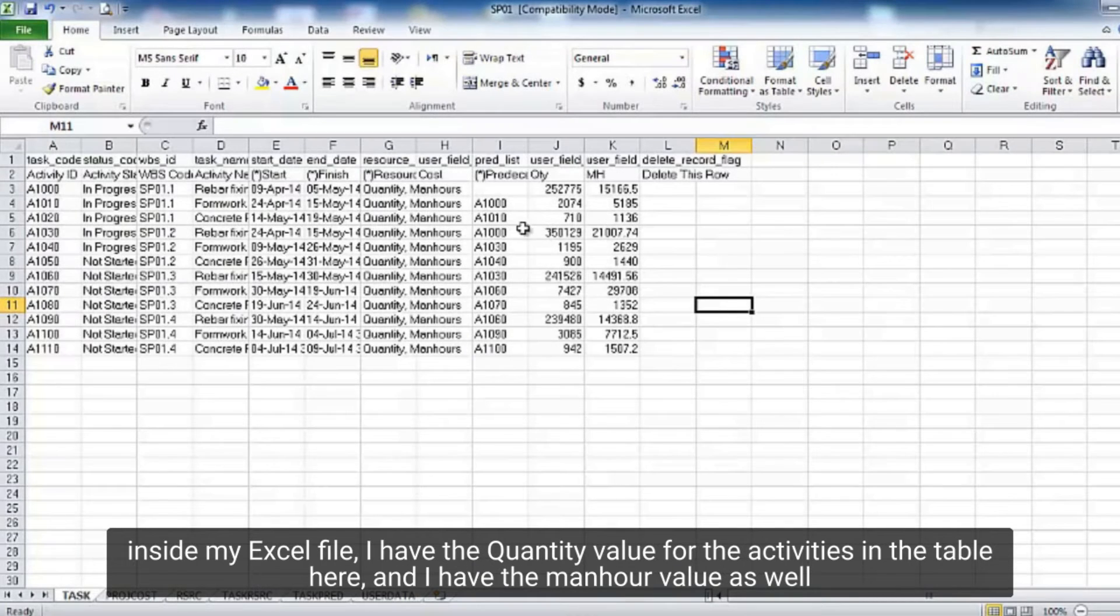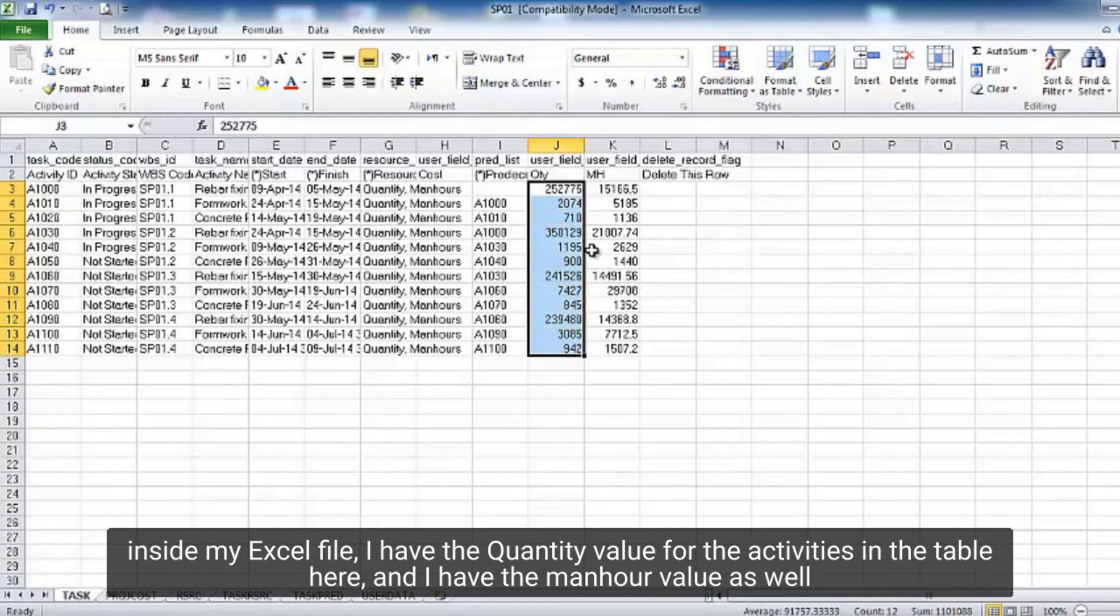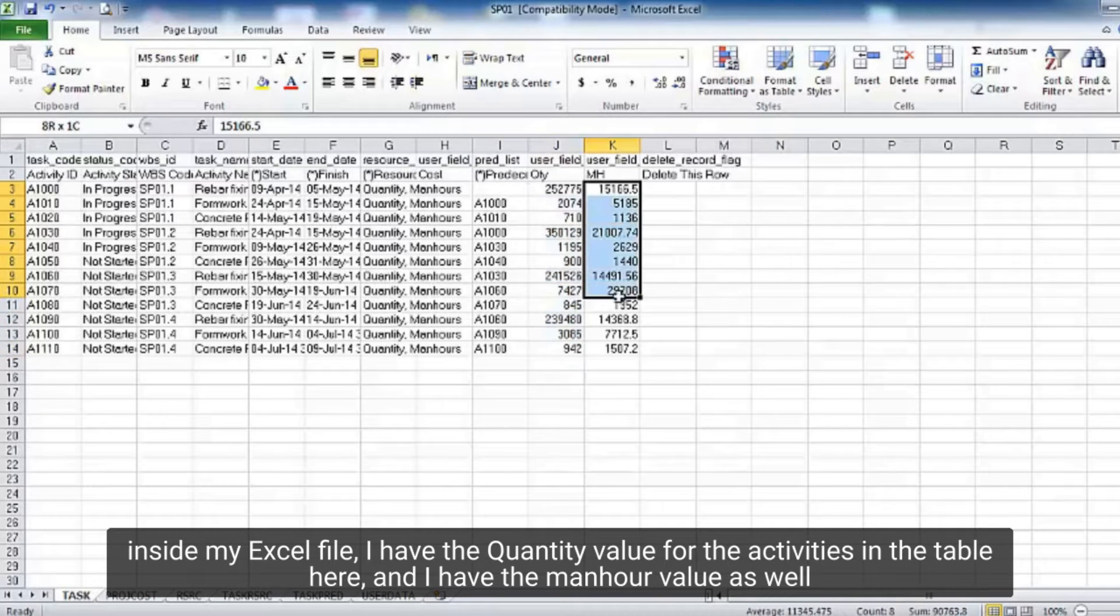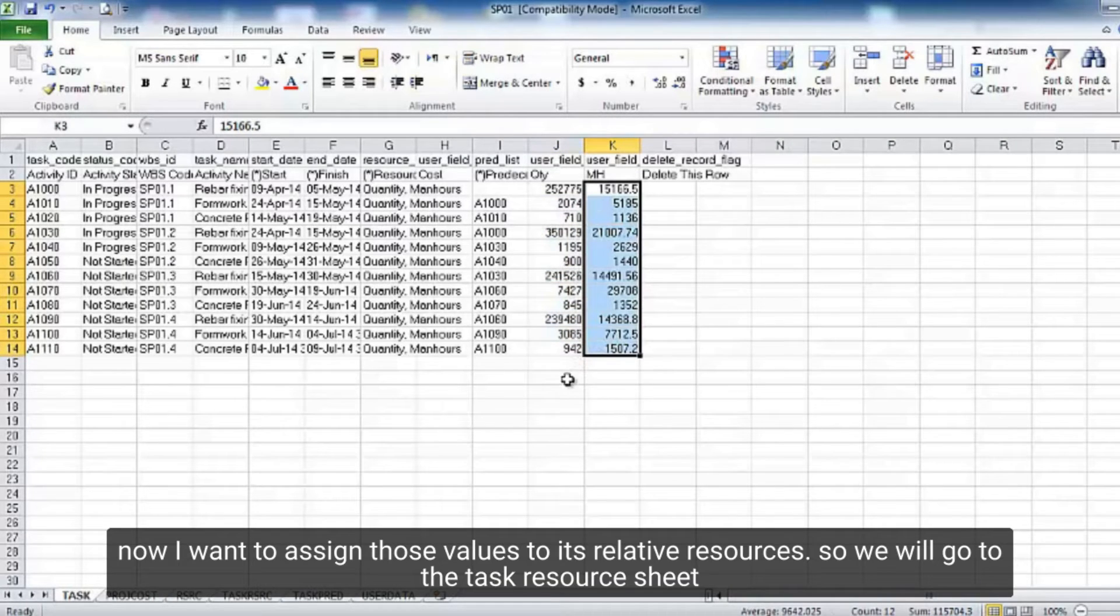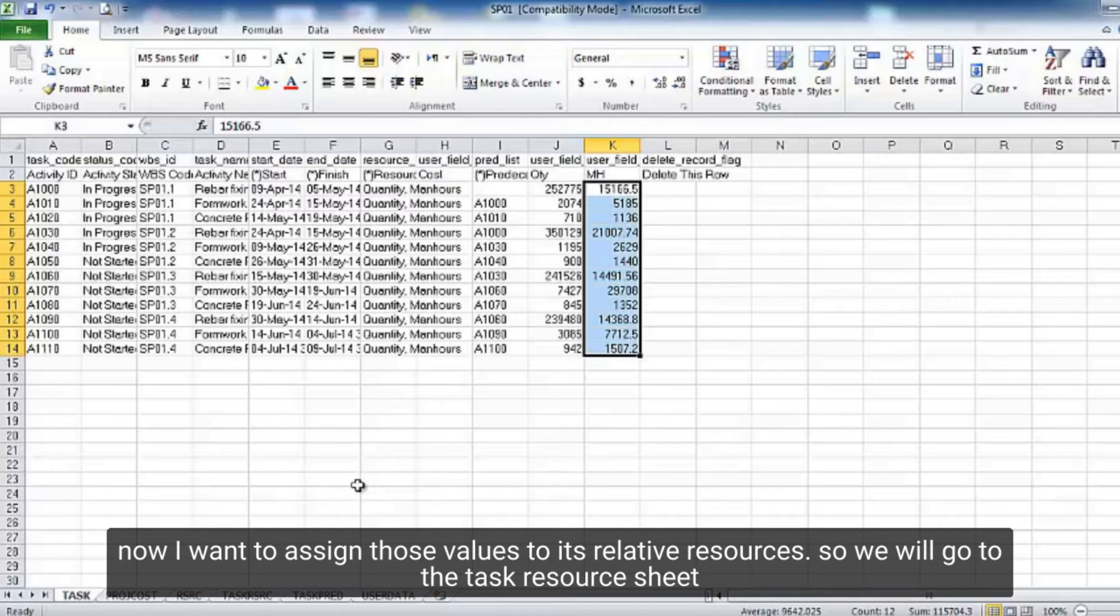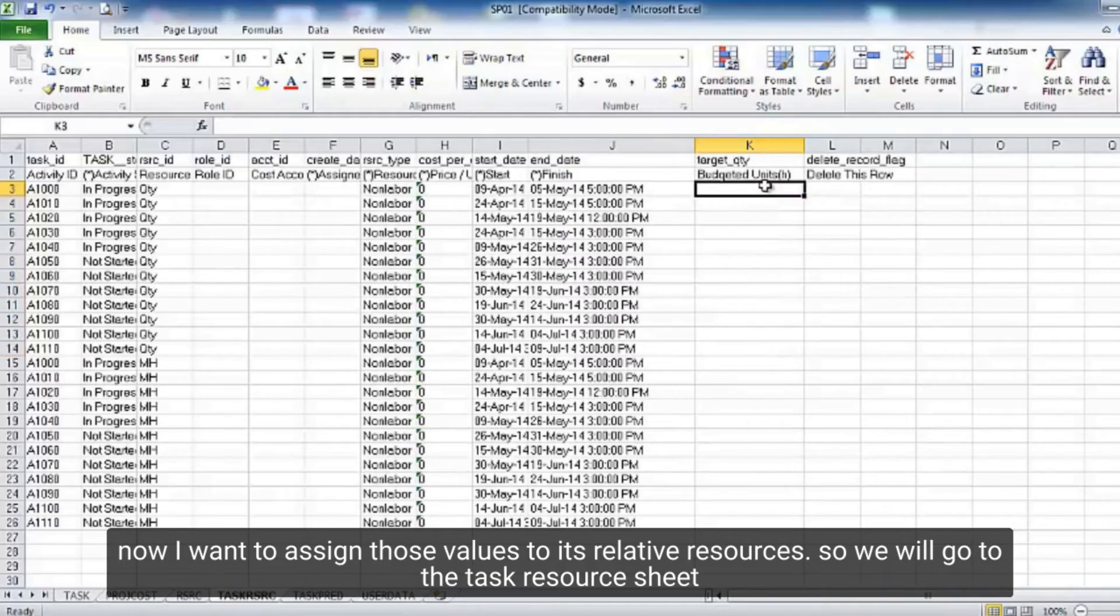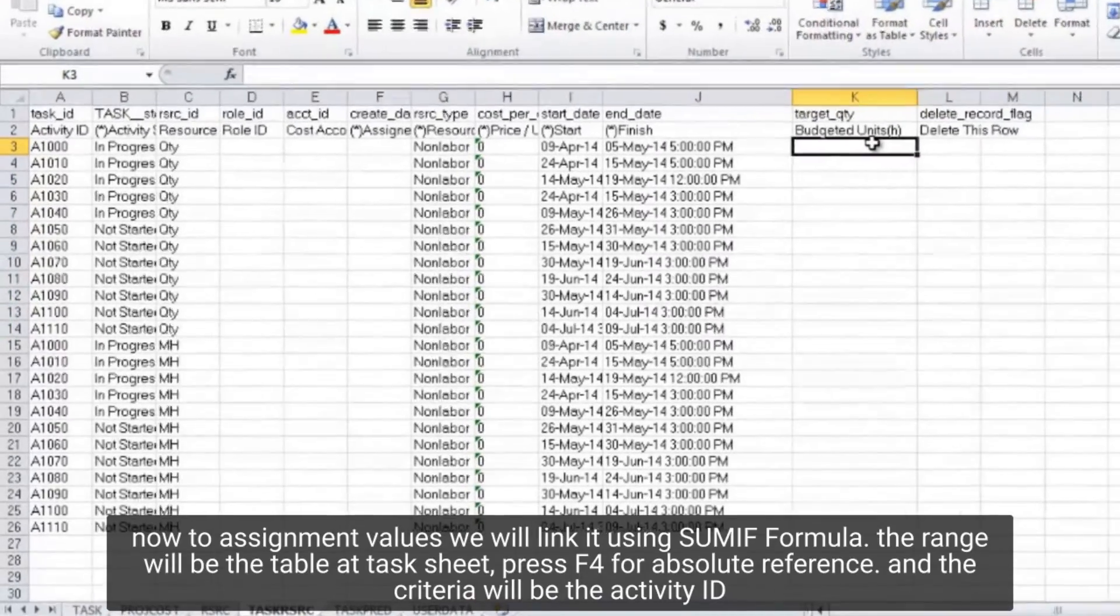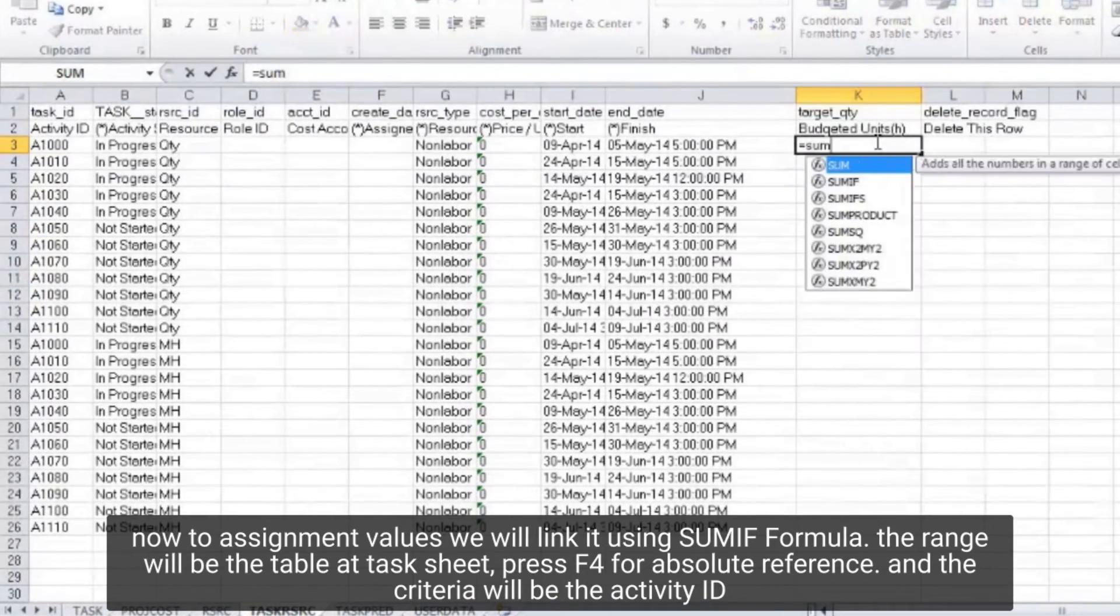And I will open that excel file exported from the primavera here. Inside my excel file, I have the quantity value for the activities in the table here, and I have the man hour value as well. Now I want to assign those values to its relative resources. So, we will go to the task resource sheet. Now to assignment values we will link it using sumif formula.